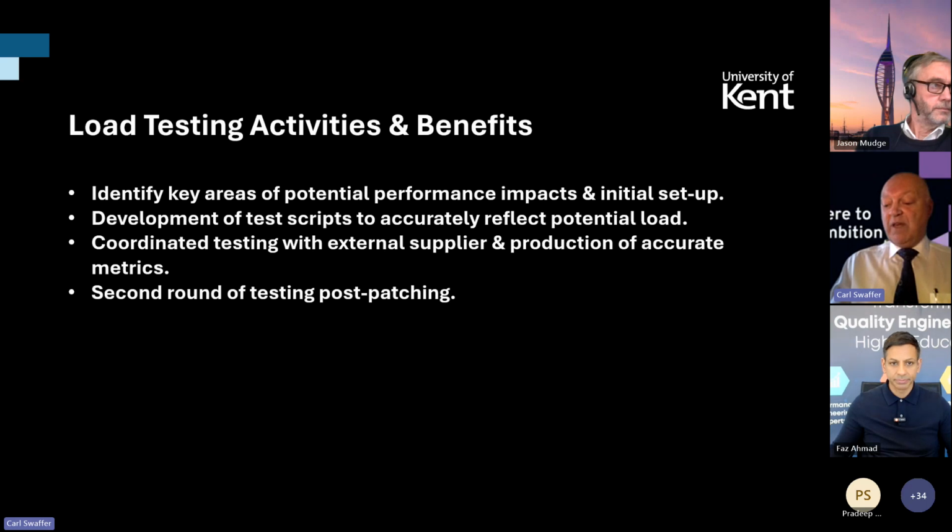Given the groundwork from the initial testing round, we were able to prepare much more quickly this time, although due to further late security patches released by Tribal, we were put in a somewhat difficult position of having to weigh up the risks of further patches against delaying the load testing. We were, however, at the end of the day, able to complete both patching and testing in time and ultimately had a very successful clearing round.